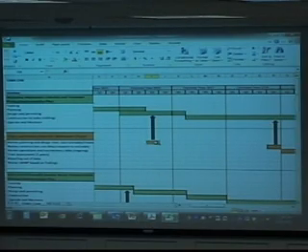So I've got this orange square at Q3 2016, assuming we've finished 90% design, if you will. And you can say, okay, were the planning level estimates close to the preliminary design estimates? So you get to 90% design and you do a much better job of actually costing out your collection and treatment system. There's another trigger point at 18 where we got our bids in, we started to construct this. Are sewers in the same price range as we thought? Because that will inform future decisions. Were they more expensive, were they less expensive? So I've thought of these two places.